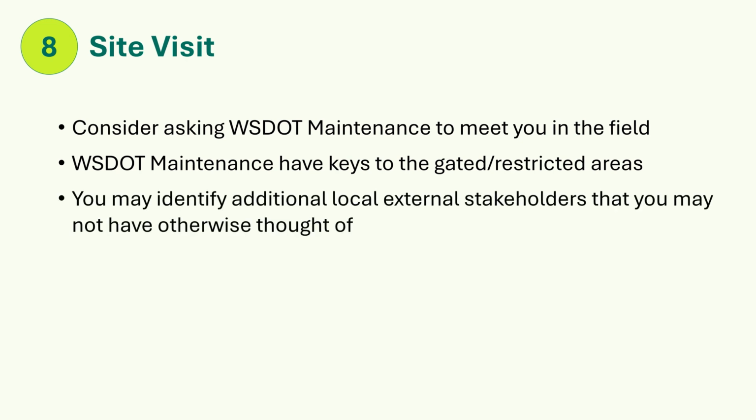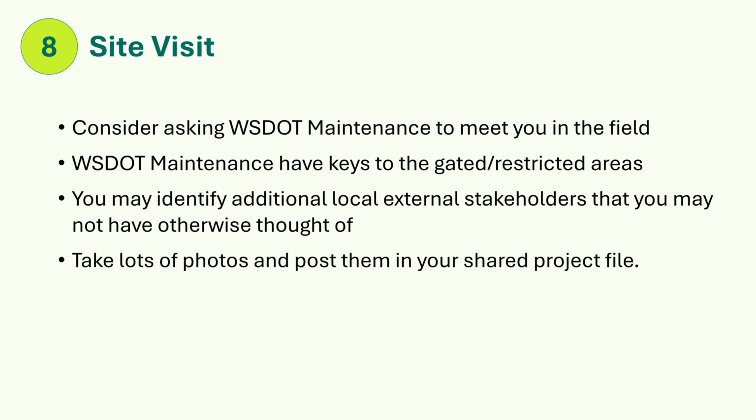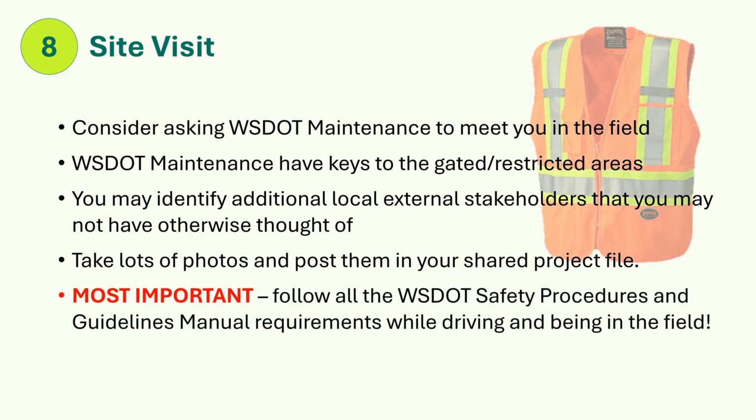You may identify additional local external stakeholders that you may not have otherwise thought of. For example, take note of how mail is delivered, trash is picked up, school bus operations, package delivery services, meal delivery services pickup drop-off, or other unique aspects of your project area. Take lots of photos and post them in your shared project file. Most important, follow all the WSDOT safety procedures and guidelines manual requirements while driving and being in the field.